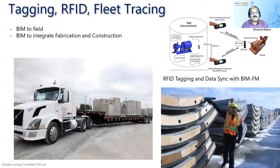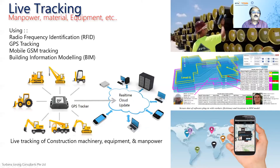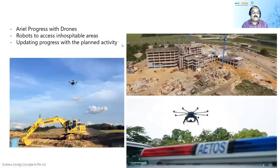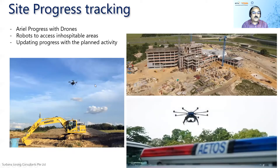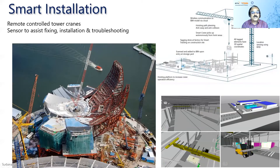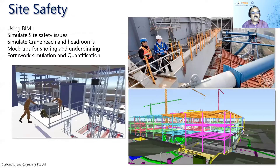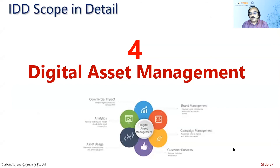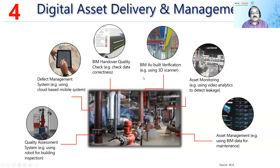In digital construction we can use RFID technology to manage and monitor pre-constructed components from the factory. We can do live tracking using digital geofencing to track people and machinery. Drones are also part of IDD for site progress tracking and monitoring. Smart installation using sensors allows equipment like cranes to communicate and prevent accidents. IDD processes include simulations of how to carry a component from one floor to another, all critical for site safety.